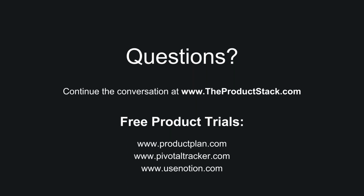And then once you get into the tactical mode where you're breaking down a feature into small stories, that's when you're estimating in actual points as a team to uncover different assumptions, to get everybody on the same page, and to try and keep your granularity super high. So small stories. That's where estimation comes in later.